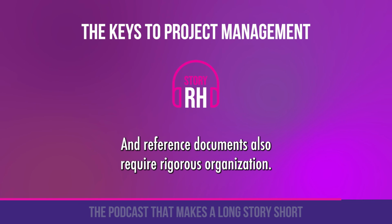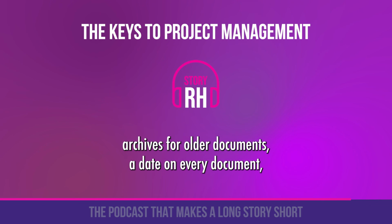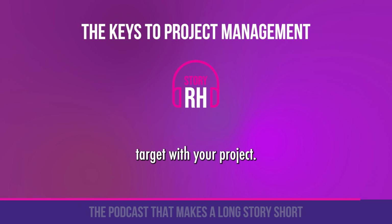And reference documents also require rigorous organization. In other words, a clear and shared classification system, archives for older documents, a date on every document, and a version number. These 5 keys will help you to stay on target with your project.